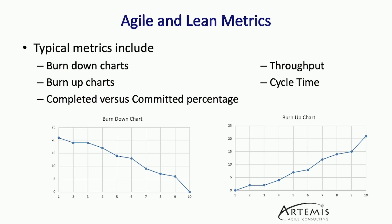Another metric is going to be your completed versus your committed percentage. This is the amount of work that was delivered at the end of the sprint versus how much work was committed at the beginning of the sprint. It's really important that this number be between 80 and 100%, perhaps even up to 105% if the team found they were able to complete some work early and had additional capacity. I would be very cautious about any percentages that go over about 105% because that may be indicative of an anti-pattern where the team does not feel comfortable committing to work they are clearly capable of delivering.